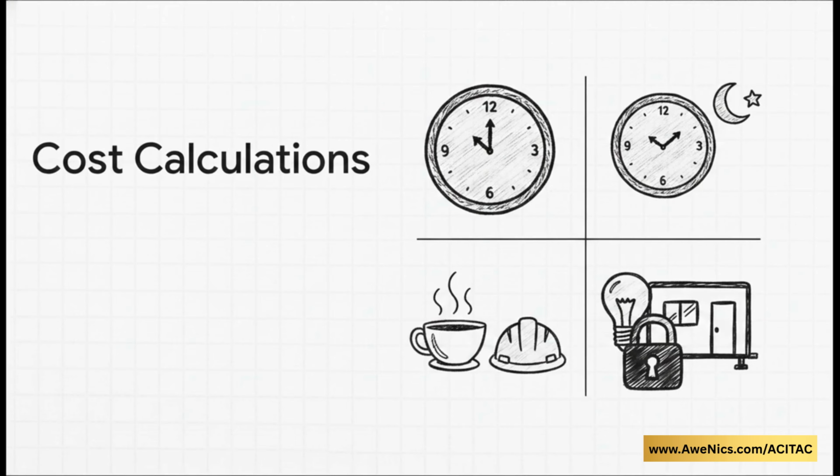There's a cost per use field. For example, if you buy a cup of tea for every laborer every single time they're deployed, you can assign a cost per use, and the software calculates all of that automatically. Finally, if you have broad, flat costs like monthly electricity or site setup, you can add those as fixed costs directly in the Gantt chart cost table.